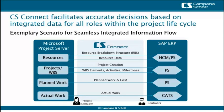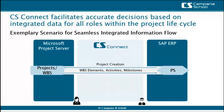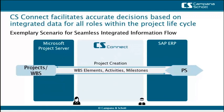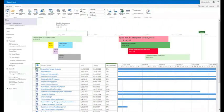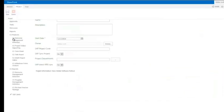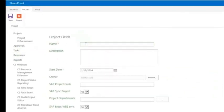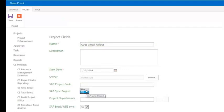Let's dive into a short demo showing the project creation and the WBS elements set up in Microsoft Project Server plus their transfer to SAP. The project manager initiates a new project with the project web app. He sets project master data like the project name and enables the synchronization with SAP.